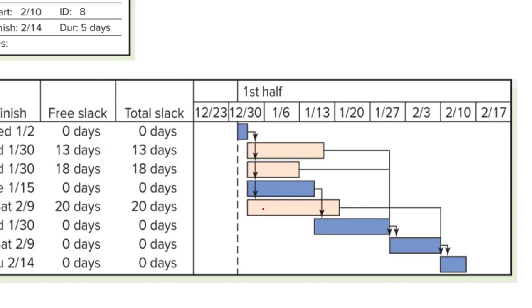These relationships seem to indicate that when one task finishes, the next task can start, although these 4 are scheduled concurrently to all start at the same time. They may in fact have a start-to-start relationship. So in software in particular, you can schedule in so that different activities have certain relationships. Some things may need to start together or finish together and so forth.